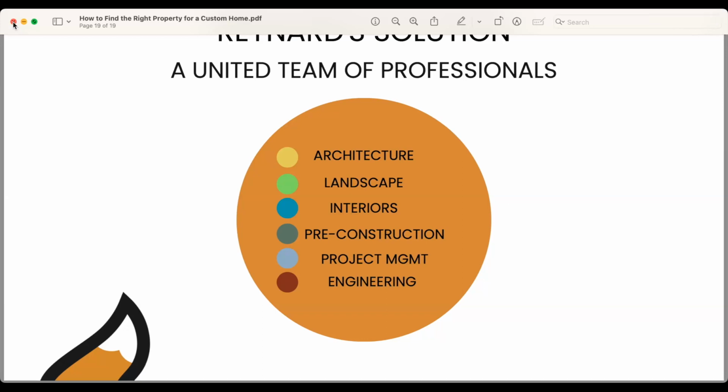Do we do renovation design? No, we do not. We did that in the past, but as I answered that question earlier, those are the things I would think about with a renovation. You can talk to architects who will do them and interior designers who will do them. But again, are you expanding the home? Get a site survey. Are you making exterior changes to the home? Understand the covenants, and is it historical? Is it covenants, HOA? What are they going to approve or not approve? Get existing as-built drawings, get good as-built drawings before you start a renovation.